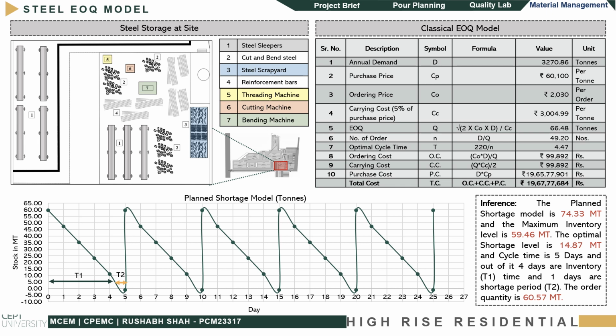First, the steel rate is 50,932 per metric ton. Second, the carrying cost is calculated as 5% of the steel purchase price. Third, storage costs are calculated as 20% of steel purchase. Fourth, for the analysis, 220 working days are taken from the yearly demand of 9 months.